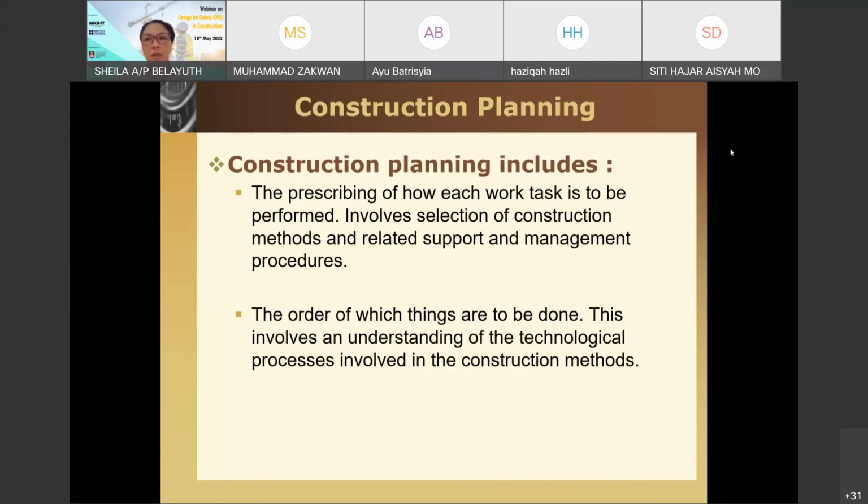So it's very important, because of wrong arrangement of the activities, wrong connection, and on top of that, you might have wrong assignment given. Activity B should start one week after, but from your arrangement, if it's wrong, then your subcon comes in this week. So you will create a chaotic situation. So it's very important to understand the sequence, the order, which comes after which.